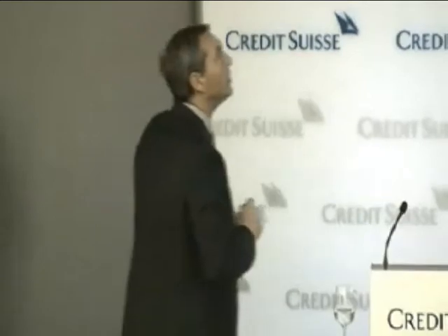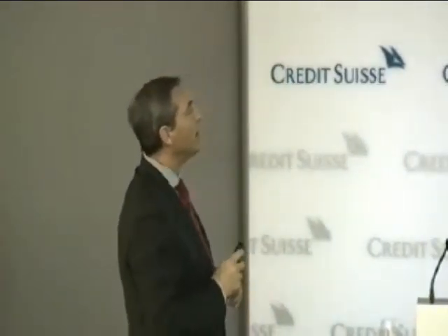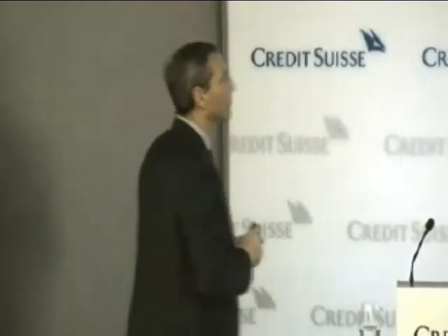As well as possible, the project team identified all the potential risks. The team proceeded by calculating the impact, how many Swiss francs. According to previous experience of similar works, the probability of each risk was fixed. And then they processed the impact and the probability in indices. So we had 3 indices, 1, 2, and 3 for the impact, and 3 indices, 1, 2, and 3 for the probability. They don't talk about francs or percentage, but only 1, 2, and 3.